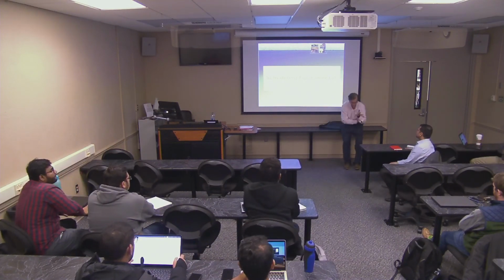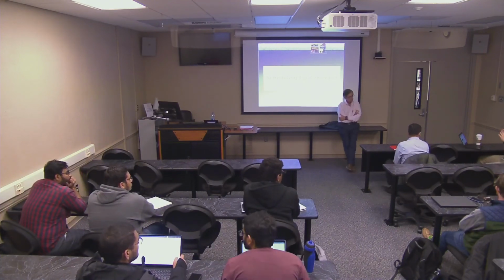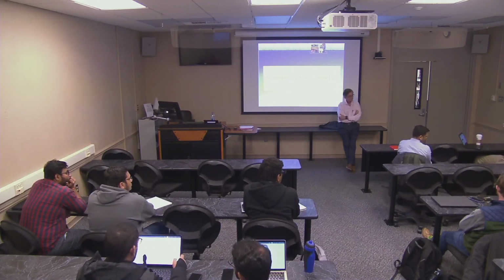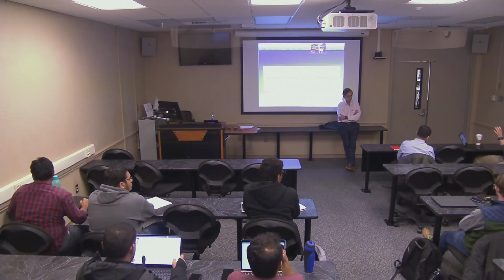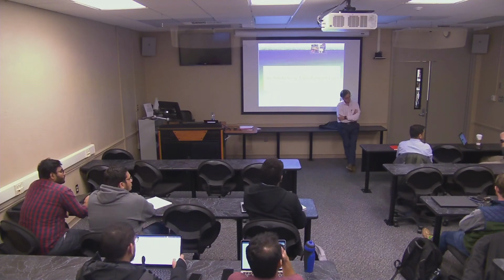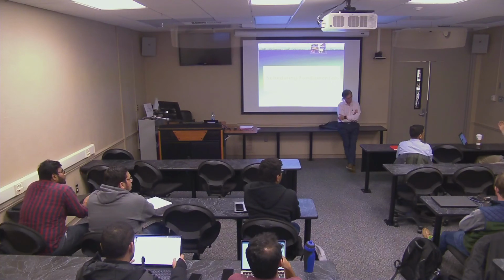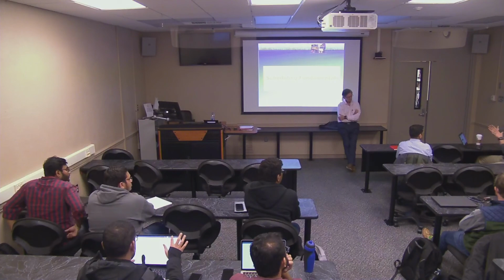How about the rest of you? Go ahead. On a lot of our projects, my role is cradle to gate type planning, all the way from programming to operation. But on a construction level, we always sit down and go through the master, take the divisions of work, look at those and figure out which ones are applicable to the project. Some people call it last planner, I call it backwards planning. You start at the end, we know when we have to have something, and then we start working our way backwards: what do I need done before final inspection? Well then, what do I need done before that?